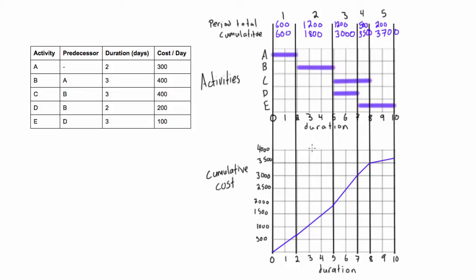Now this can be by man hours or percent of cost, things like that. In this case, we'll do the percent of the total cost of the project. So what we do is we just break down each period here into the percentage of the total cost of the project.